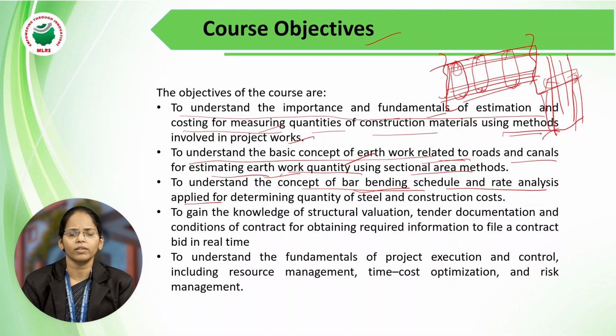So before any construction, we definitely need to calculate the bar bending schedule, to remove the wastage of the material and to reduce the expenses. So that is the bar bending schedule that we learn here.